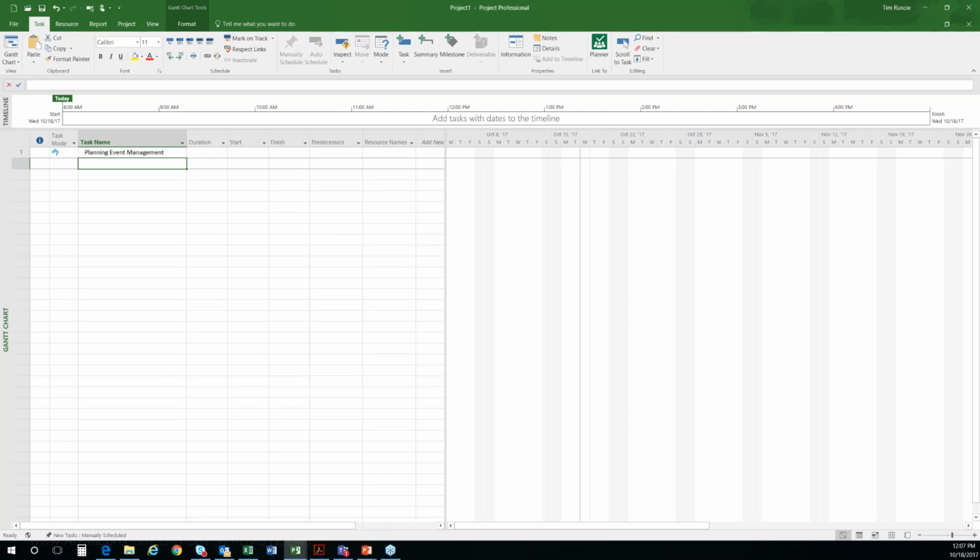Now, the nice thing about it is this tells Project, even though it's a relational database, that this can behave like a spreadsheet. So for example, for your duration, you could say, well, I don't know. And so instead of looking at numbers or dates, you can say, hey, this is TBD. You can begin filling this out. You can copy and paste from other systems directly in here and not have to fight the scheduling engine as you build that. So in terms of getting started, at least out of the gate, manual is a great concept. I also use this in agile planning where there are things I just want to move around. I don't want to deal with the constraint messages that pop up.